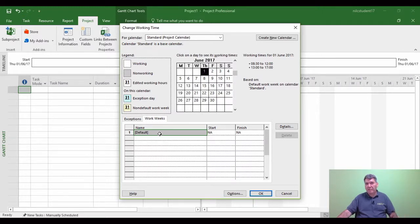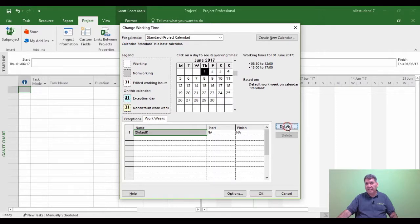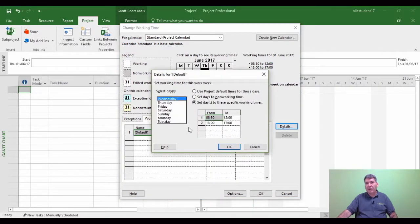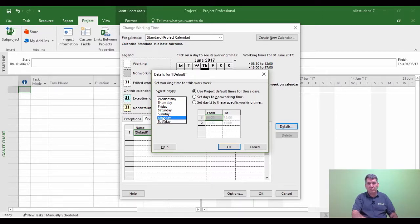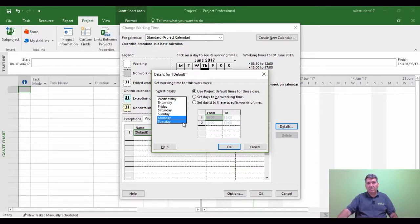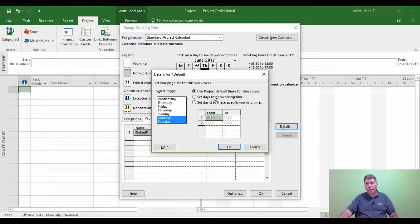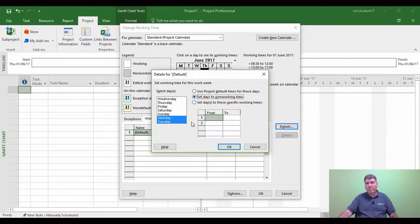So the same idea, default, details, and I now need to tell it non-working. So the non-working is going to be the Monday and the Tuesday. So click on Monday, shift key down, click on Tuesday. And I'm now going to tell them this is non-working. So I'm telling project Monday and Tuesday now I'm not working. It's the second option. And then click OK.